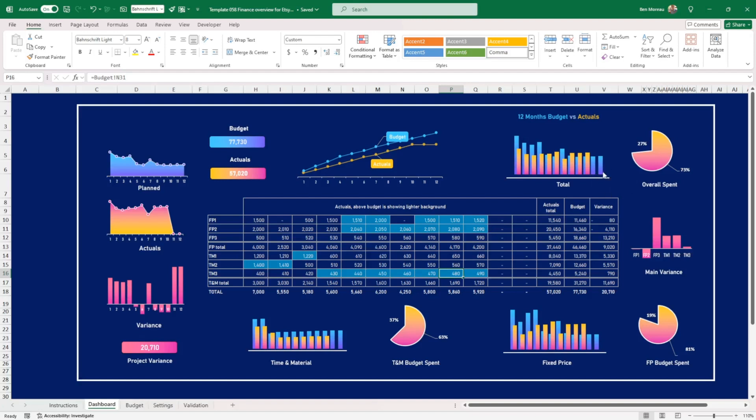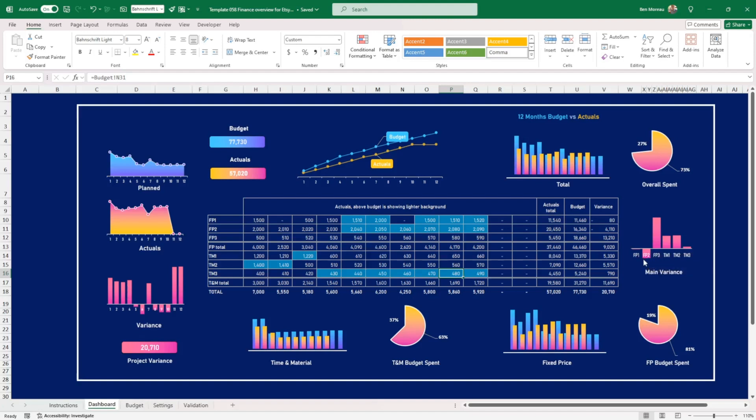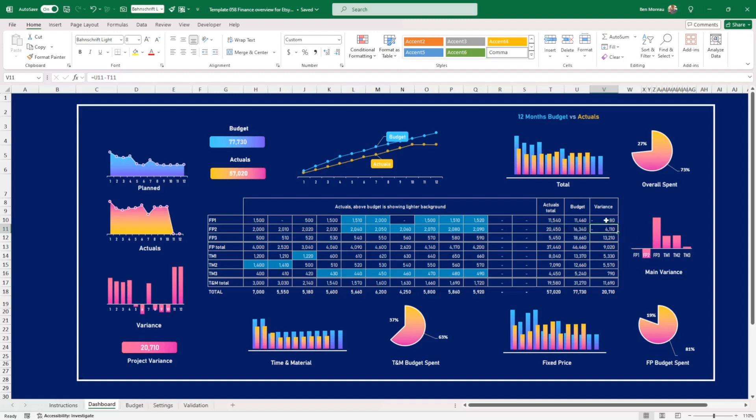And then you have the last two months here. Overall spent, I spent 73% of my budget so far. So that's a variance. You can see that for a fixed price, I have a negative variance, but for all the rest, I have a positive variance. So here that's because of this, that I have a negative. And actually FP12 is negative, but not by much.